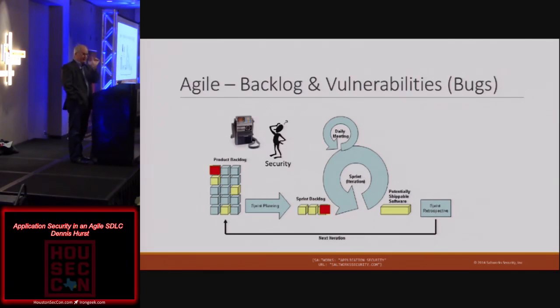Now, those may be little bitty tests. It may be static analysis where only 5 things change, so you don't get many results. They don't have to deal with much. It's very consumable, as opposed to scanning at the end of a process and killing them with results. So the activity needs to be integrated. And you need to kind of think about, is this a one-time thing or is this an every Scrum thing?